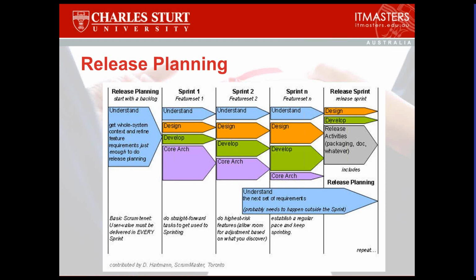Take a bridge building analogy: you'll build the pylons before you put the deck on. So there are things that need to happen first, and those kinds of structural supporting architecture do need to happen up front. This is part of your release planning. What should come in up front? And what should happen a bit later? Because it's going to be dependent upon things that have happened before it.